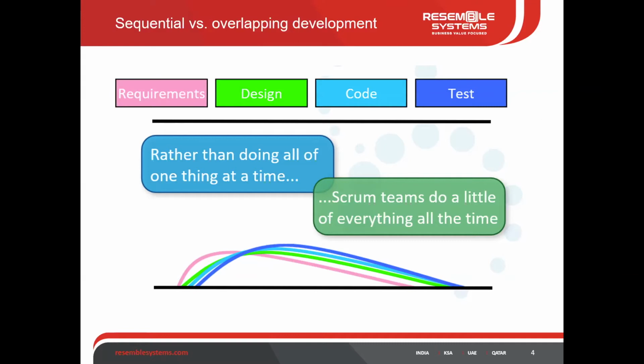And the Scrum team will do this small thing within that sprint 1. For that also there will be a requirement session. You do the design, you do the code, and you do the testing within those 2 weeks. So I am going to roll out something more mature within that time frame by following this practice, rather than doing all the testing or all the designing at one point of time. So I hope you got this part.